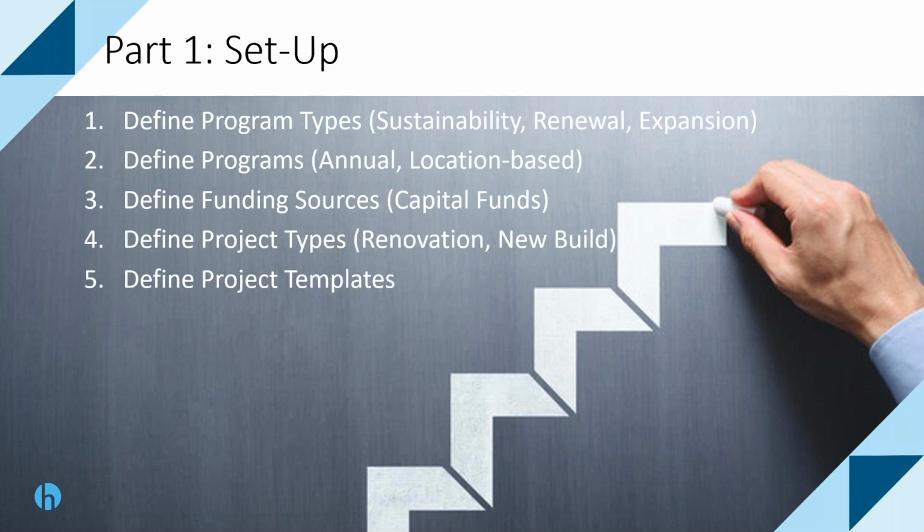You can create a template, and then every time you use or ask for that project, you can automatically generate a series of records in the system, which basically you just have to update the dates and the costs of. So these things are quite useful in terms of setting up the system.